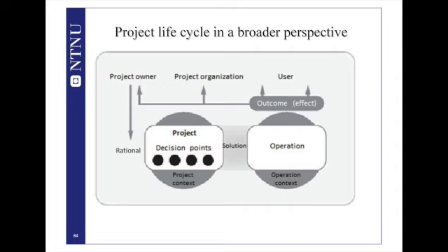One of the typical mistakes in many organizations is that they think the project life cycle ends when you deliver an output. So they say the project life cycle is you plan, you execute, you deliver, and everything stops here. Well, our understanding of a project life cycle has changed over time. Now we acknowledge that the project life cycle is longer than we expected, and it should include the operation phase.